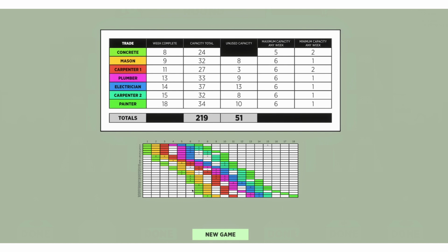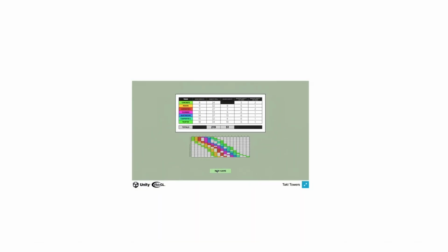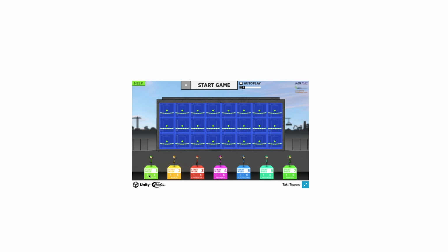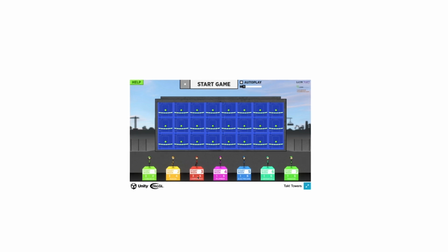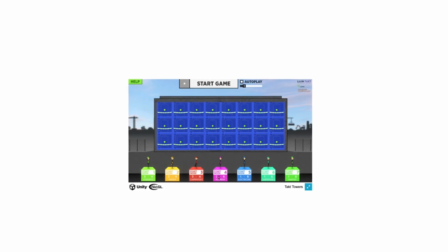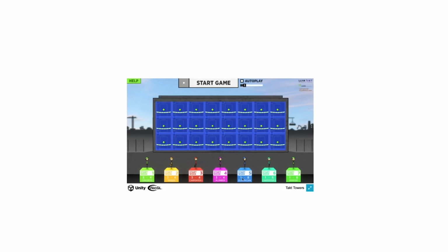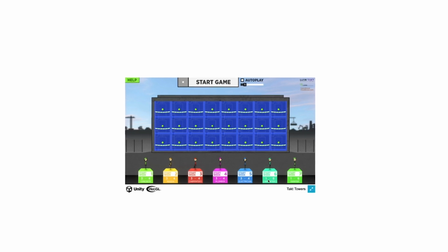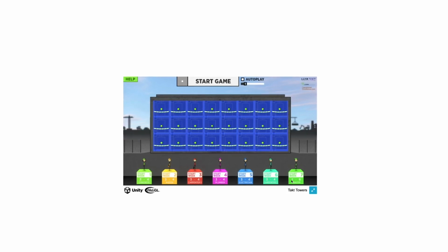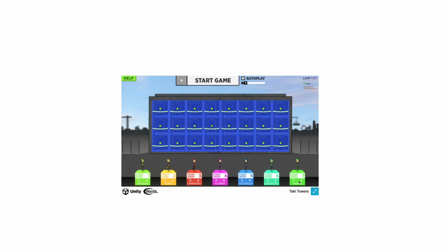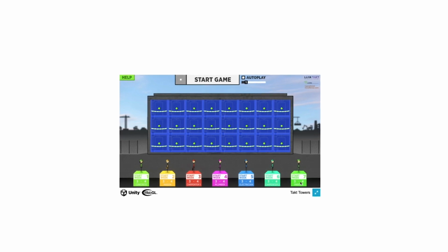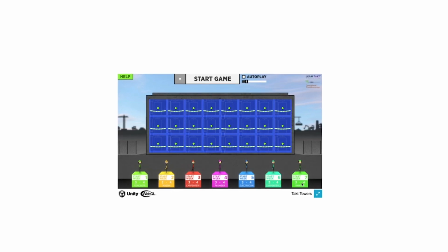So not ideal. Okay, so let's go ahead and look at what would happen if we created some more consistency. So what if I increase these to 3 and reduce the high limit to 4? What this basically means is that we're going to spend more time planning and preparing, more time keeping people in rhythm, go slower. But because we have more time to plan and prepare, and because we're focused on a rhythm instead of rushing and pushing and panicking, now we have better certainty and we're not going to roll 1.